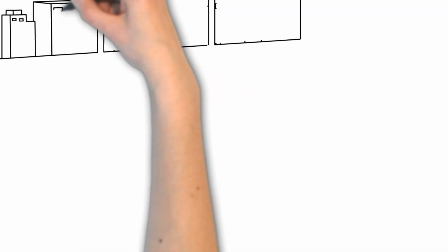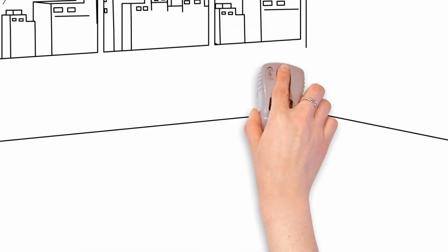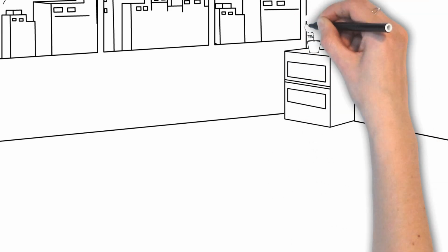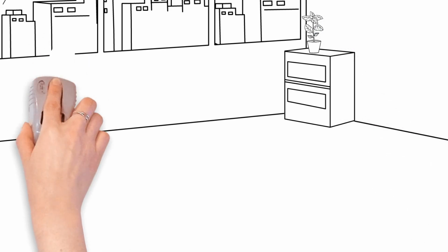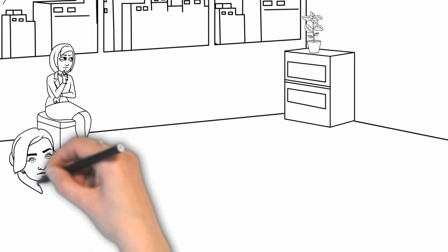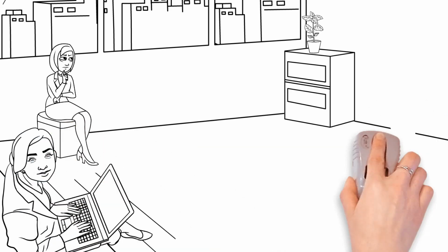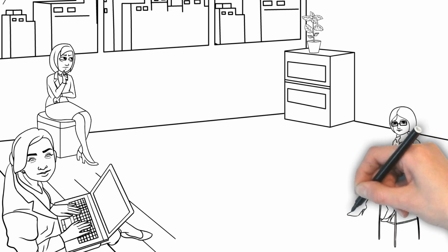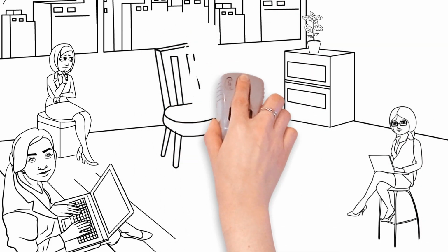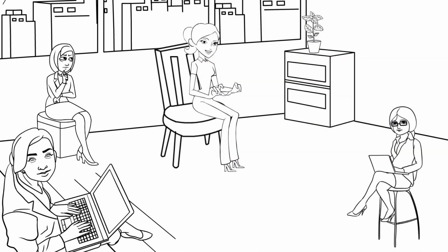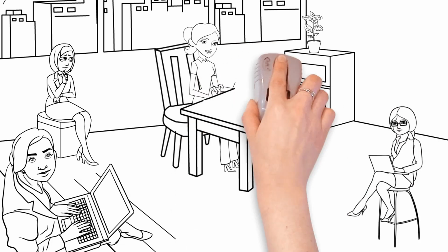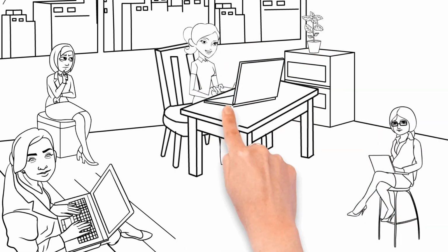If the organization does not have the particular resource that you need available for your project, acquiring will be a bit more complicated. You may need to seek out software or physical facilities, which will need a bit of extra sophistication to acquire than an internal resource reservation. You may need to seek out contract staff to do certain roles in the project. You will acquire vendors' services with a contract. You can see where this is starting to mean more money for the project, and the process for acquiring is getting more sophisticated as well.